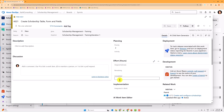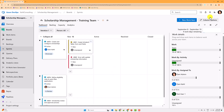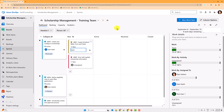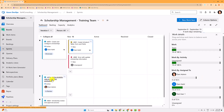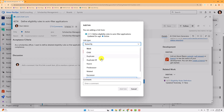To work with this, go to your bugs and tasks and specify the effort: the original estimate of how much time you think something will take — let's say 16 hours — and the remaining time, also 16 since we haven't started. You can now see 16 hours of work with no one assigned. Let me assign it to Danny, save it — Danny now has 16 hours out of a capacity of 72.